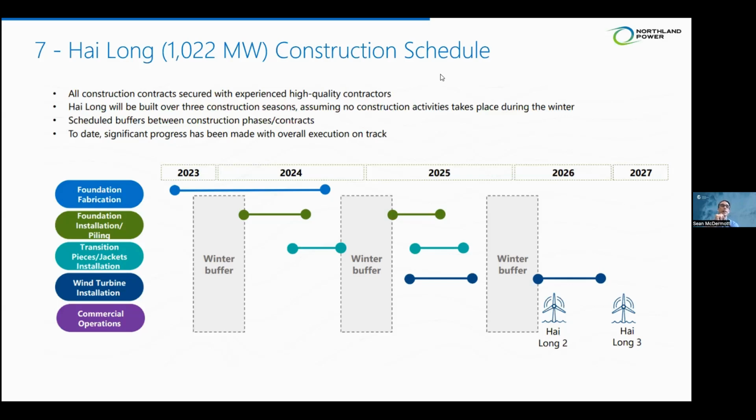Those are all very significant packages, all of which are in the critical path. If any of those are late or delayed, it can delay the whole project.